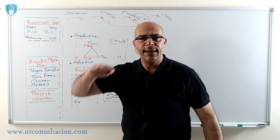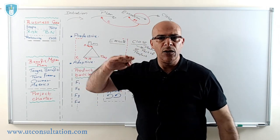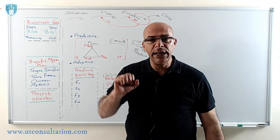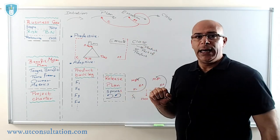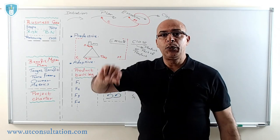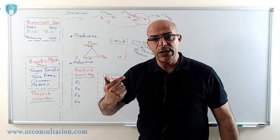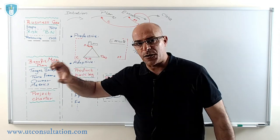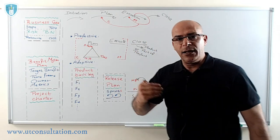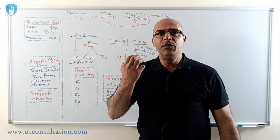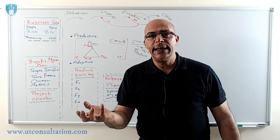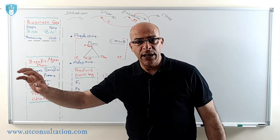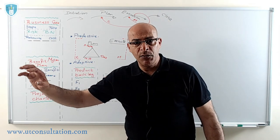Features are divided into priority levels: high, low, medium, etc. This is the product backlog. The goal of this process is to start producing the highest business value features first — the features with the highest business value are what we start working on and building within a certain time frame or time box.